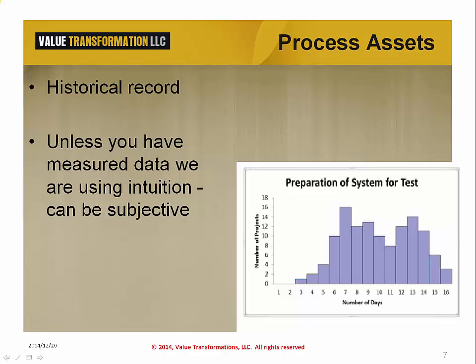Historical data is nice to have when it comes to understanding risk. This data demonstrates how things have worked in the past and perhaps how things may work in the immediate future. With historical data, we can alter our project plans from those approaches in the past that have not yielded the desired results. There are complications, however, with historical data around how the data was collected, and was the collected data from a recurring or well-established process or the result of ad hoc. Even if you have this information, the team is new and the project by definition not operations, so the exact replication may not be possible. There will be more on this in later modules.